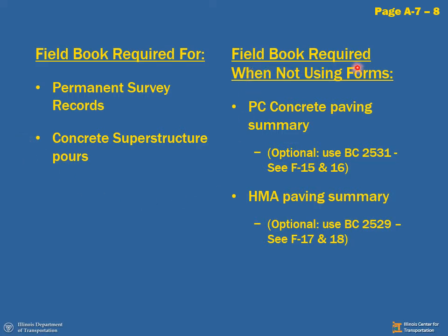Field books are also required when you're not using pre-printed forms for PCC paving or Portland cement concrete paving or hot mix asphalt, HMA paving. If you are using one of these two pre-printed summary forms, you do not need to use a field book.